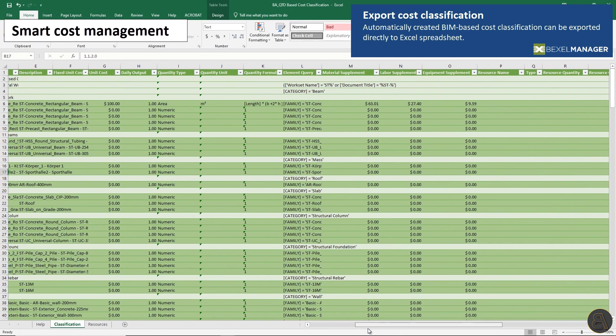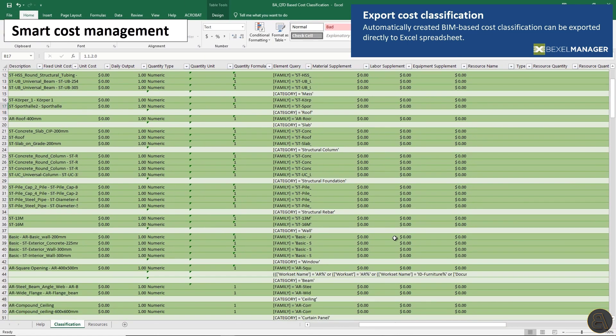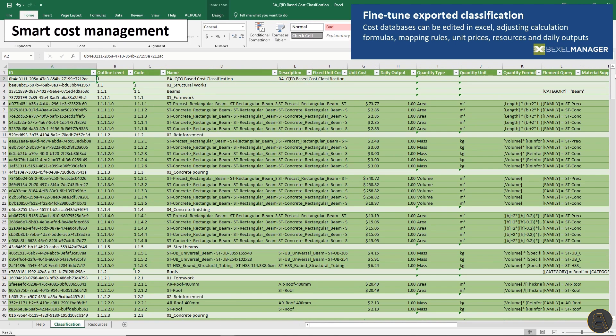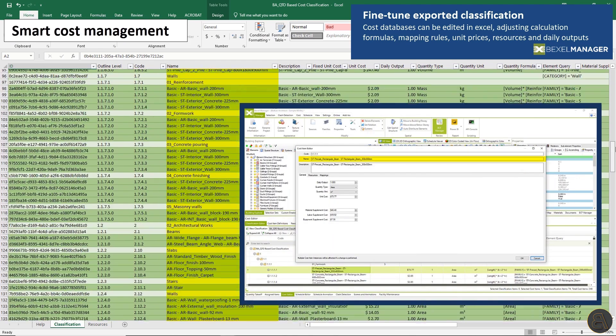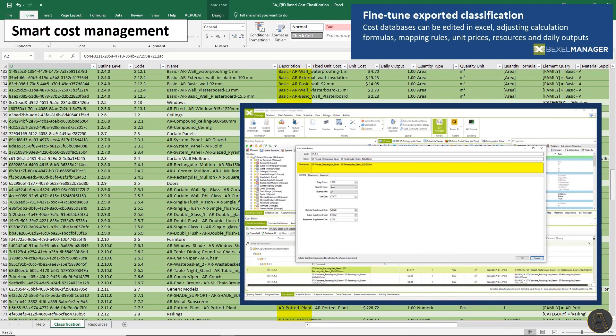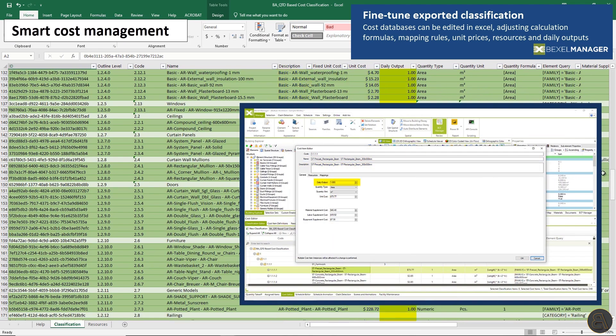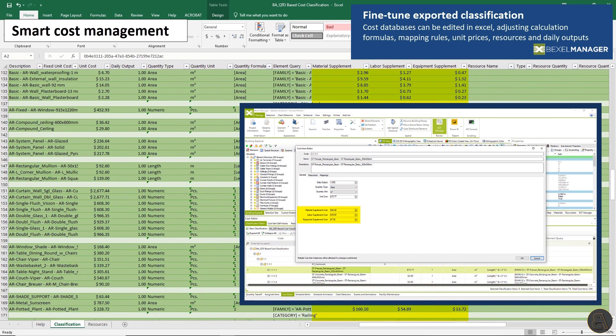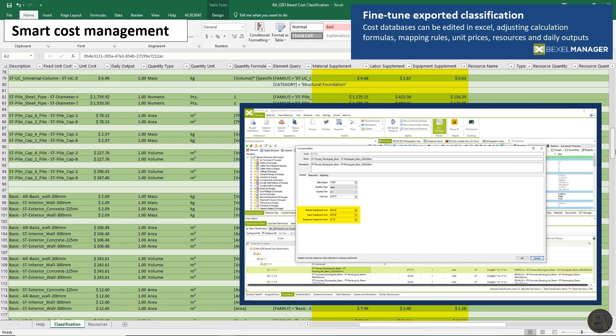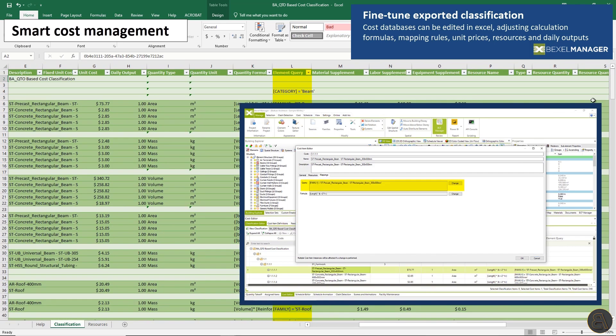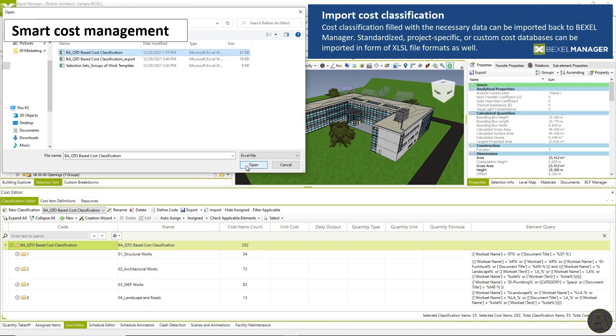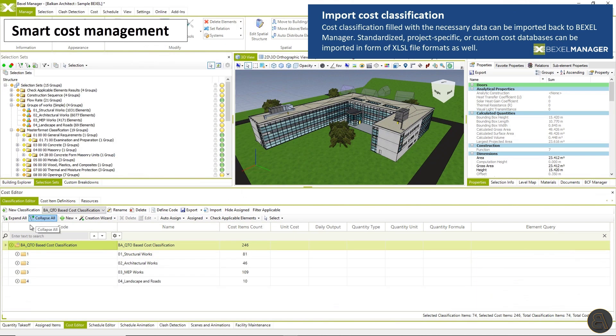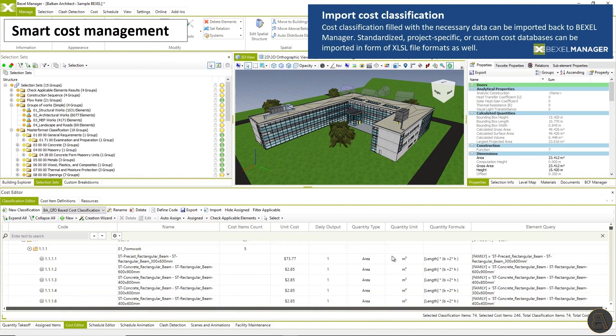Resources, or speed up the process and export created cost classification to Excel for even easier editing. Cost databases can be edited in Excel adjusting calculation formula, mapping rules, unit prices, resources, and daily outputs. Cost classification filled with the necessary data can be imported back to Bexel manager.